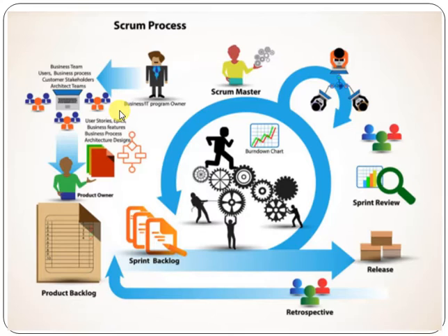Now the main difference between Scrum and the waterfall approach is that in the waterfall approach, we get feedback from the customer only once we reach UAT, or user acceptance testing. In Scrum, because we are using the concept of a sprint, we get feedback from the customer at a very early stage of the project, and we can make any amendments if needed.